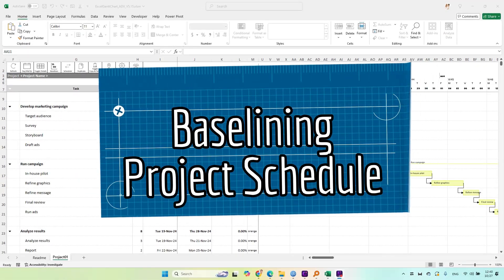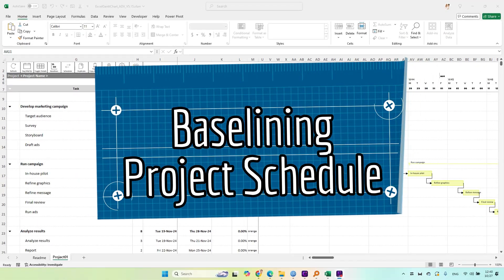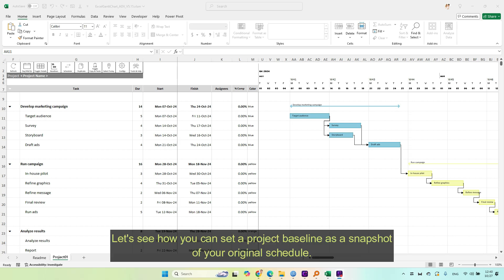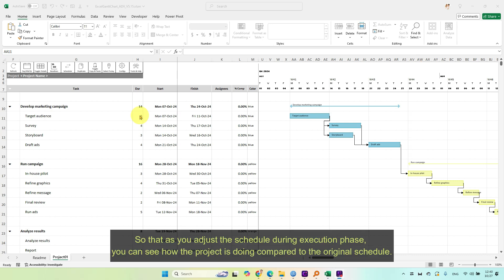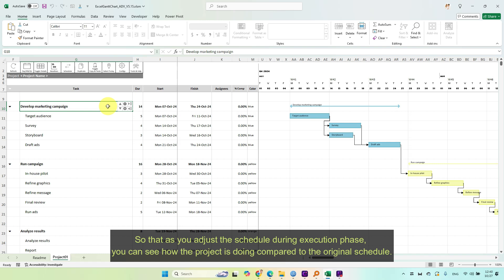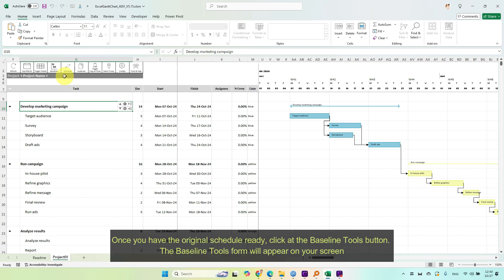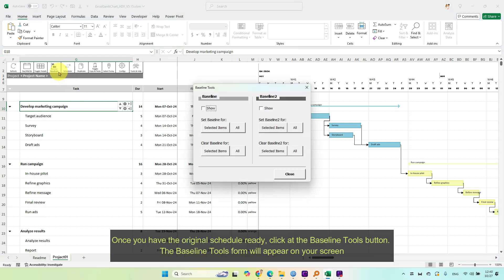Baselining project schedule. Let's see how you can set a project baseline as a snapshot of your original schedule. So that as you adjust the schedule during execution phase, you can see how the project is doing compared to the original schedule. Once you have the original schedule ready, click the baseline tools button.